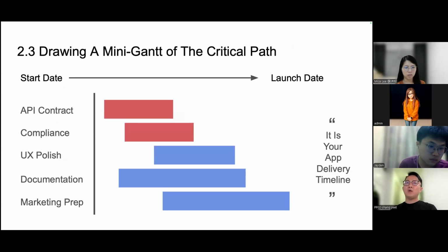and hence the importance of adding the buffers, right? So after getting all the dates, you should start planning or put them into a Gantt chart, which is basically the timeline that you're seeing here to develop each thing. So you put together, you should be able to make sure whatever you want to build and all the timelines you derive for each of the features and components fit into the hard deadline that you get from studying the contract or the SRS document.